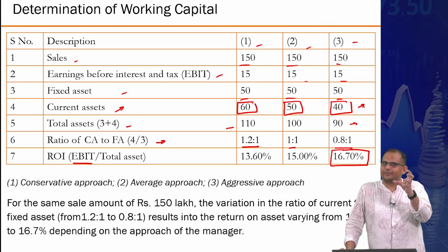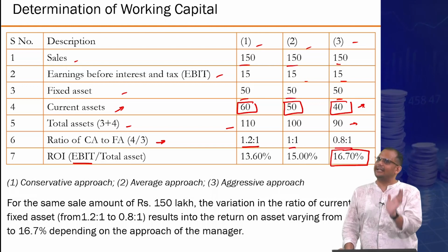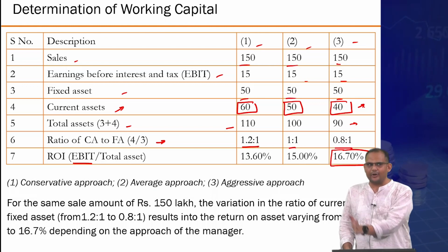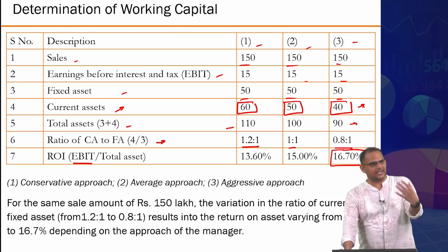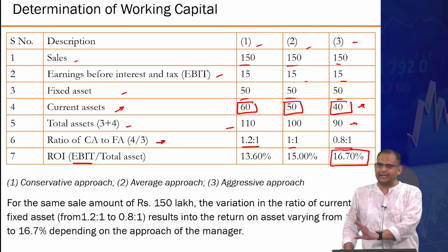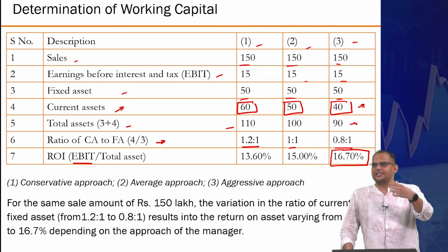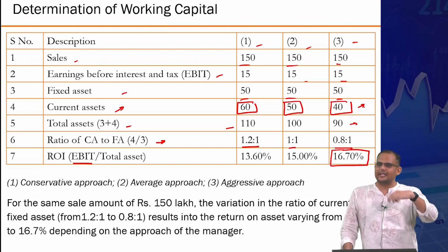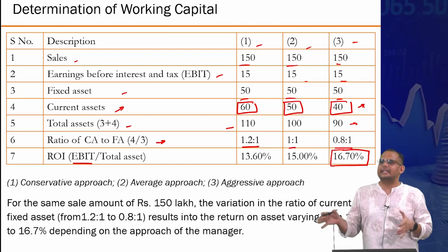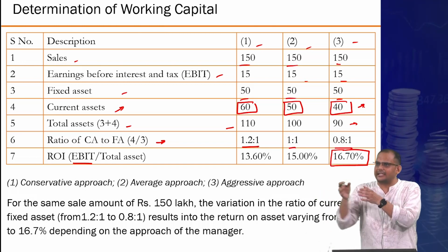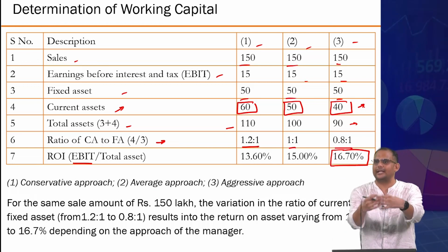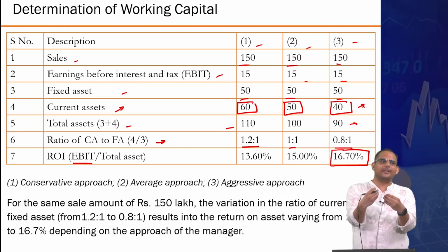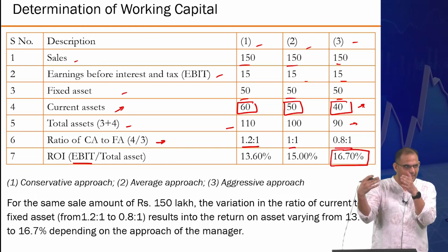But less working capital is also kind of a high risk, high reward strategy. The reward is higher because your ROI percentage goes higher. But as I also mentioned, sometimes working capital is required as a redundancy in the system. If something fails, can you quickly fall back onto something else? In order to be prepared for that, you need to have working capital put in the system.